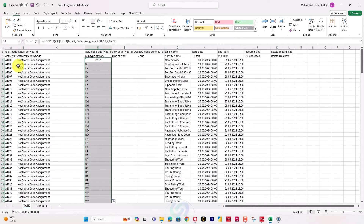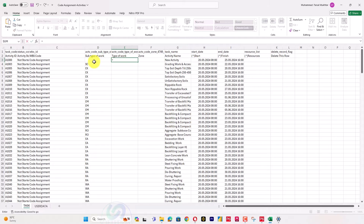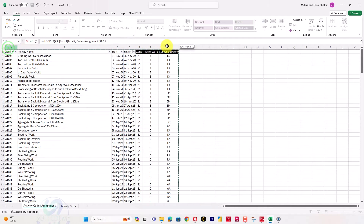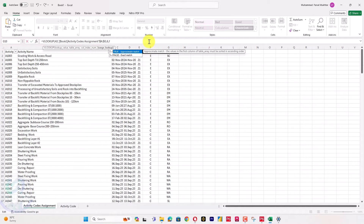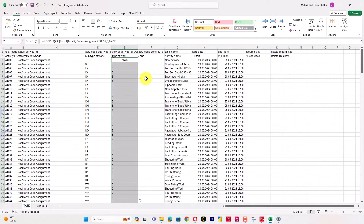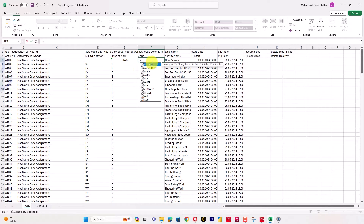This activity ID is not available, but the others are. Now I will apply the same VLOOKUP formula for the next column — type of work — which is at column six: =VLOOKUP(A3, [data range], 6, FALSE). After pressing down, all codes will be assigned automatically.